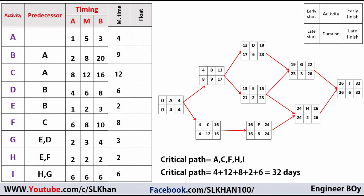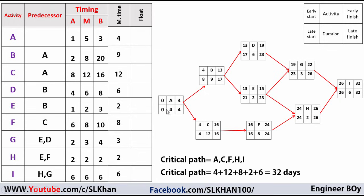Next, I'm gonna calculate the float for each activity. Float equals late start minus early start. For activity A: late start is 0, early start is 0, so float is 0. For activity B: 8 minus 4 equals 4. For activity C: 4 minus 4 equals 0. Similarly for activity I: 26 minus 26 equals 0. Now we have the floats for all activities.